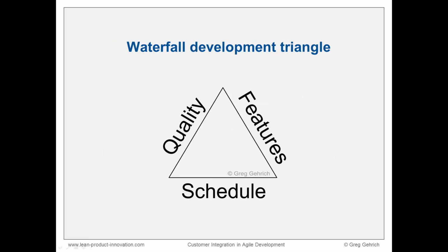When you build a software product in a traditional or waterfall project, the outcome is shaped by 3 variables. Complete X features by Y date and make sure it all works. I'm sure everyone here has received these marching orders. Unfortunately, a triangle with 3 fixed sides leaves no room for flexibility and in the real world it's rare that all the goals for quality, features, and schedule are met. Something eventually has to give, and unplanned compromises end up changing the supposedly iron triangle.